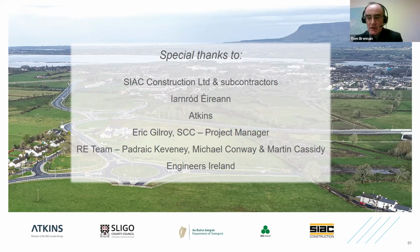Maybe I could just say that with Irish Rail in general, we did engage with them very early in the whole process, before any design work started. I think it was Michael West at the time from Irish Rail, and that's where we were first introduced to the guidance documents, the third-party guidance documents. So Irish Rail did provide them to us right from the start. So there was a roadmap as to how to work with Irish Rail. And by following those guidelines, I think it led to great success. We didn't try and skimp on anything, and we got the approvals all along the way. But those guidelines are on their website. Google them and you get them. Okay. Great, Tom. Thank you.